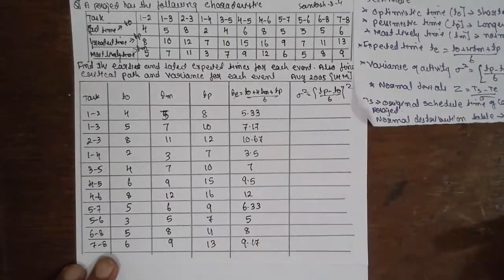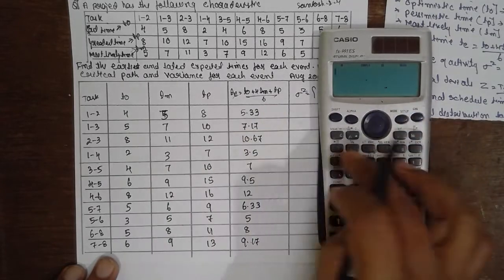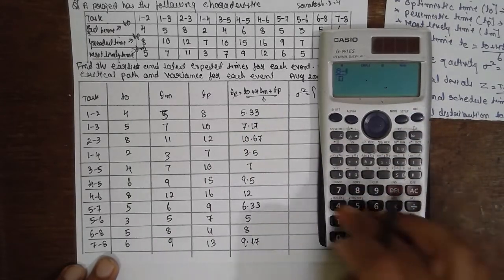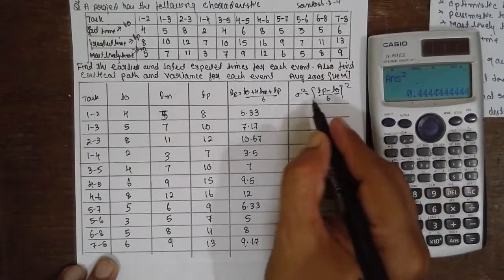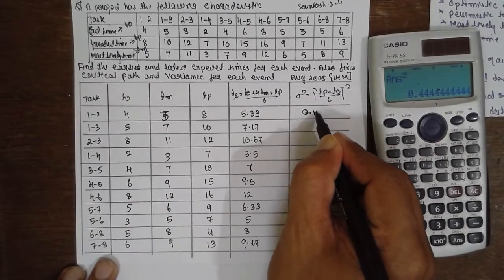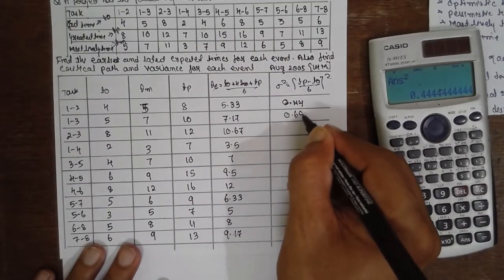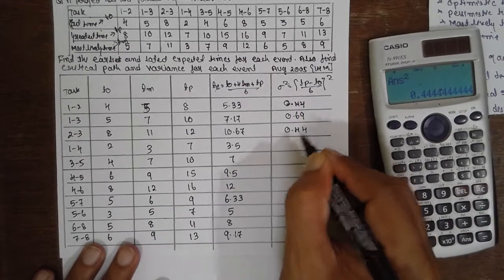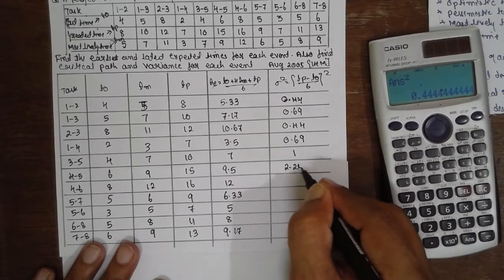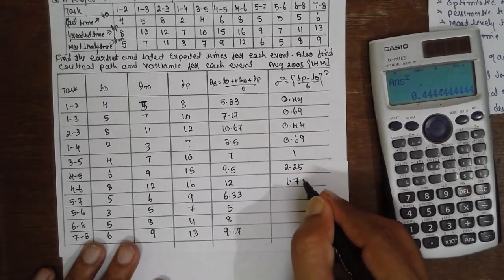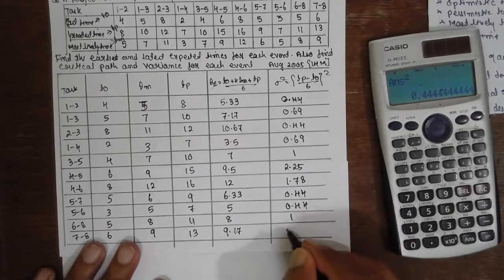To get the variance, the formula is (Tp - T0) / 6, whole square. For example, (8 - 4) / 6 whole square = 0.44. Follow the same procedure for all rows. The variance values are: 0.44, 0.69, 0.44, 0.69, 1, 2.25, 1.78, 0.44, 0.44, 1, 1.36.